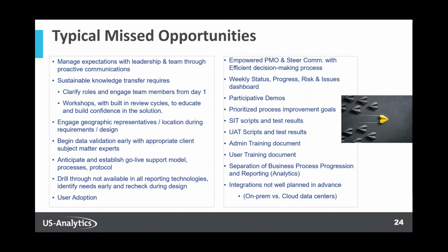Also make sure that you have your proper system integration testing and user acceptance testing, and don't be afraid to go in front of your user base and say, try it, create an account. Go in and adjust the budget for this year. Or even better, actually do a live close of the month with some test environments in order to see how that's going to work from a consolidation perspective and how they integrate. Don't be afraid to do that, work together.